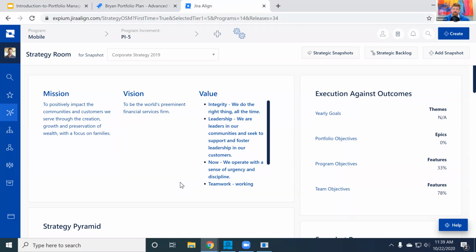Yeah, and actually, that reminds me of a side note. When you're setting up this tool, it's really important to set it up the way that the tool should be set up, which is not according to your HR hierarchy. HR hierarchies change month to month, if not year to year. Whereas if you go one layer down to your products, those change even less. And if you go one layer deeper down to your business capabilities, which is how this tool should be set up around, those things change decade to decade, maybe.